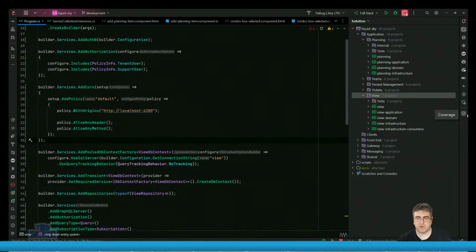So if we're in a planning meeting, a pointing meeting just for us as developers, and I say that'll take about 3 hours, so we'll point that a 2. But you go, whoa, I've never seen this code before. Then that's a pairing opportunity for the first point. That shouldn't actually be anything different.